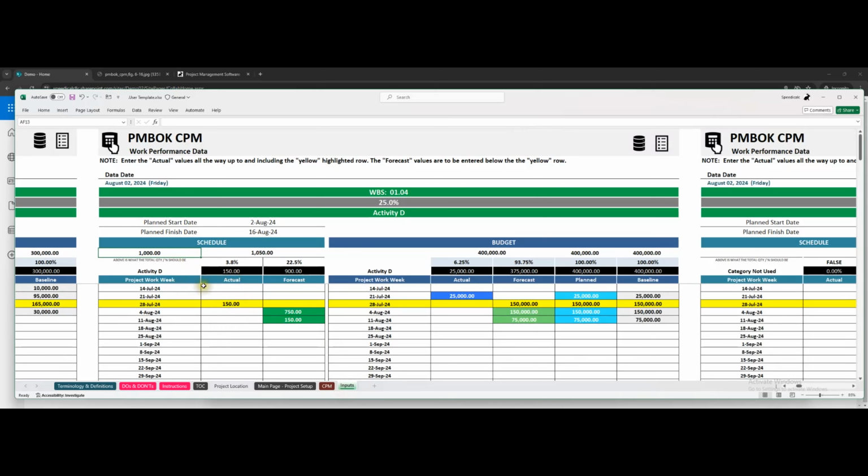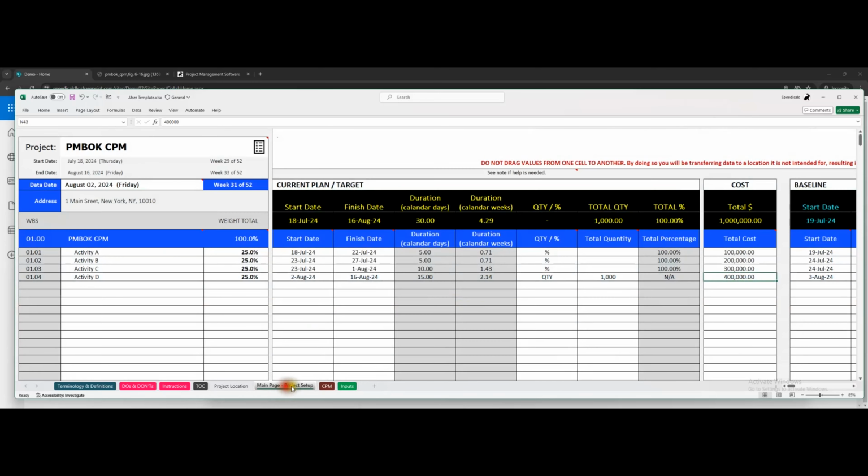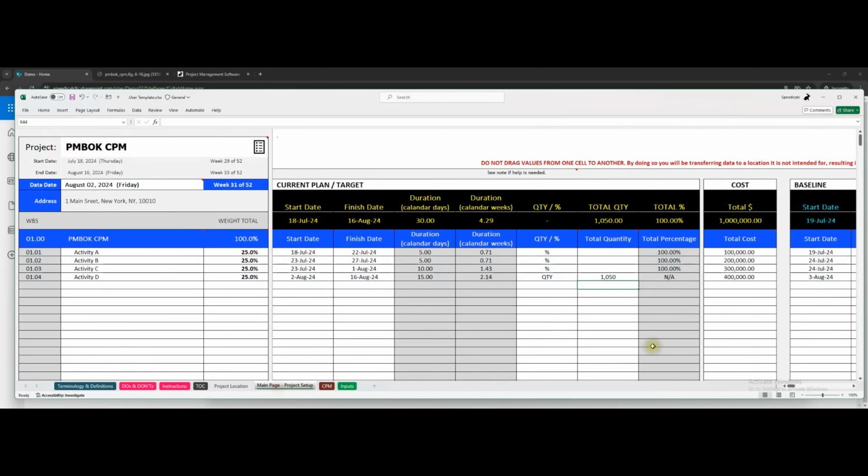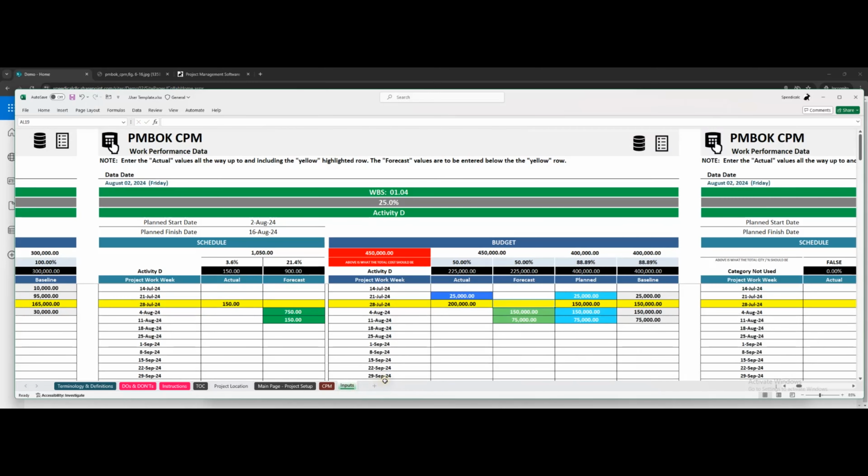But let's say that we did get approval. We have this change order. This is the case. We have 150. We have 50 more than planned. But now we got approval. So let's go to here and say we added it here. And then when we go here, that disappeared because now we're where we're supposed to be, right? 150 grand went up to 200 grand. And let's say everything else is the same. This is red and saying it's supposed to be 400 until we say it's approved for 450. And that's what I would do, the grand scheme of things.